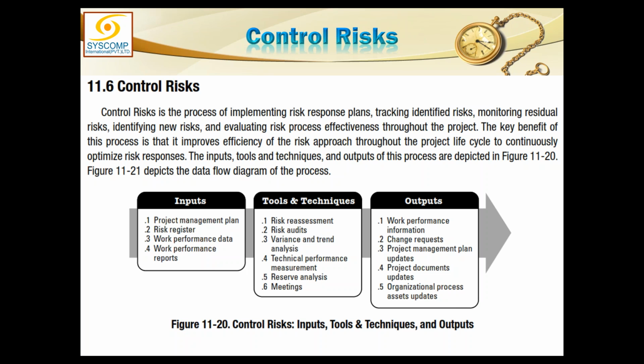Resultantly, we will have the work performance information from the work performance data analysis. If anything has to be changed in the plan, it has to be moved through a change request, and the updates to the project management plan, project documents, and organizational process assets will occur here.